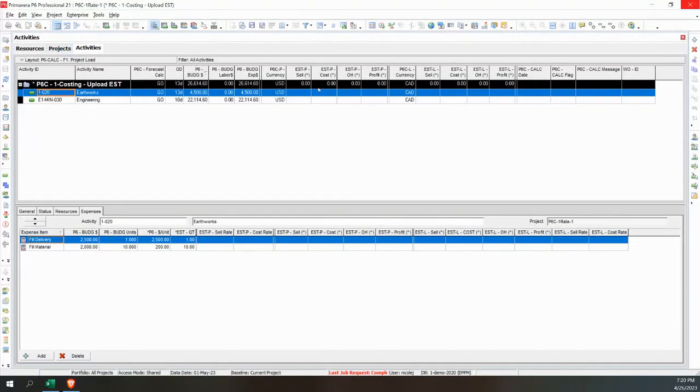Okay, so let me try and explain the fields that you're seeing here. So the example I have is we're a Canadian company, and this particular project is being run in US dollars. So it's an American project that we won or we're bidding on. And I want to see the values both in the project currency, so the currency I'm going to be communicating with the client, and the currency that I'm going to be communicating with our internal team, how we're doing, okay, against other projects. So the ledger, this is the ledger currency, if you will, or the project currency.